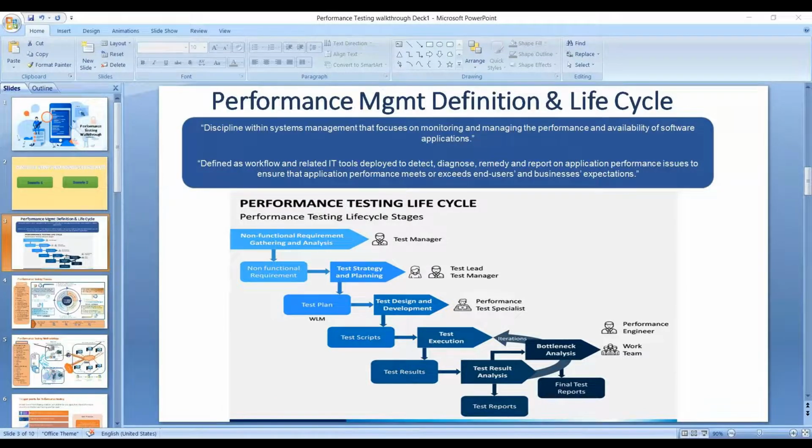But if the bandwidth doesn't allow us, we tell them, "Sir, in the initial phase of our gathering, this is what the SOW was signed, and we have agreed on this." So that is why the SOW is very important. And understanding the application is a very crucial stage from a customer's point of view.